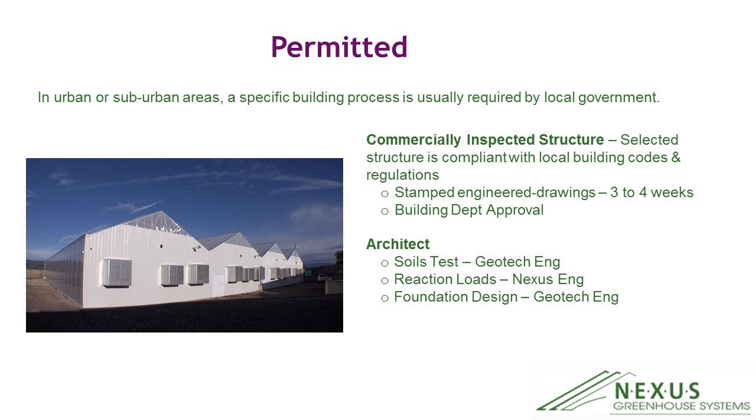Architects will probably be involved when you go to the building department. You'll probably want to involve an architect to coordinate the different jobs that need to take place. The first job is a soil test on the site. They typically come out and bore a number of holes to measure the soil's compaction. Then you'll work with a Nexus engineer to provide you reaction loads for all the different columns.